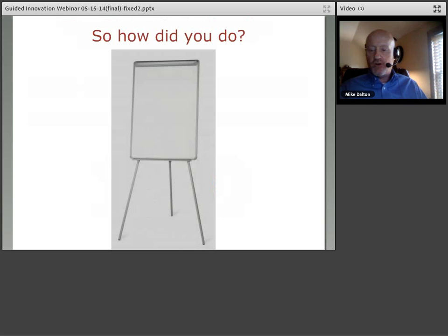And that's because the estimates that are used for tasks are really probabilities. Right? We don't know whether a task is going to be done in 13 days exactly, but we may know that it'll be done somewhere between 8 days and 16 days, so we'll call it 13 days. And so let's take a look at a simple example to understand why this happens, and also to see some of the harmful effects that has.